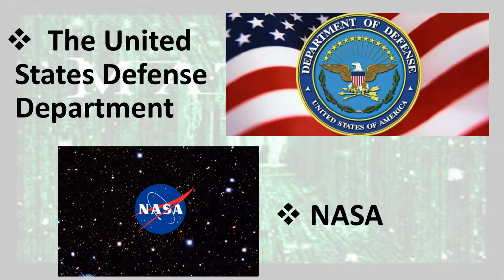Another important environmental factor is the influence of a dominant stakeholder. The history of project management indicates that much of the initial impetus for its use was a function of the United States Defense Department's and NASA's requirement to include the use of project management as part of the contract acquisition process. It was believed that this organizational arrangement would best allow the organizations bidding on large, unique, complex government projects to complete them successfully within the expected time and budget constraints.